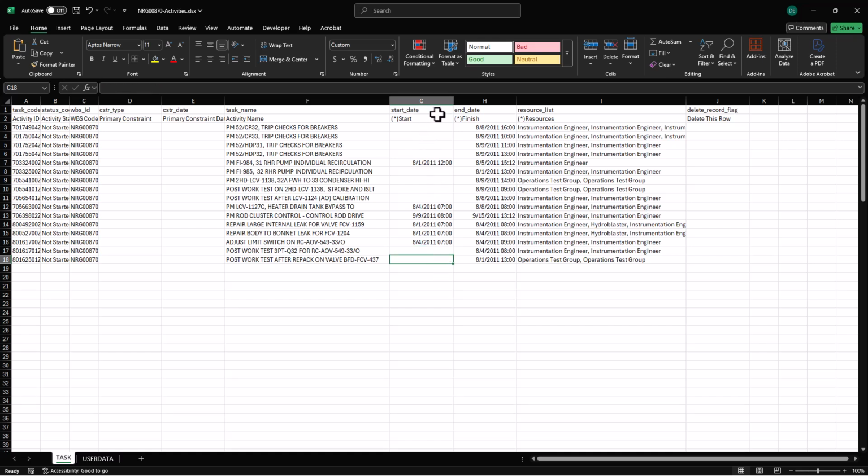So all of these tasks with the start date, they're going to come over with a start symbol and a bar and a finish symbol. And then these ones with just the end date are just going to come over with a finish symbol. So that'll be a little easier for bringing stuff over into Milestones. And to actually copy it over to Milestones,